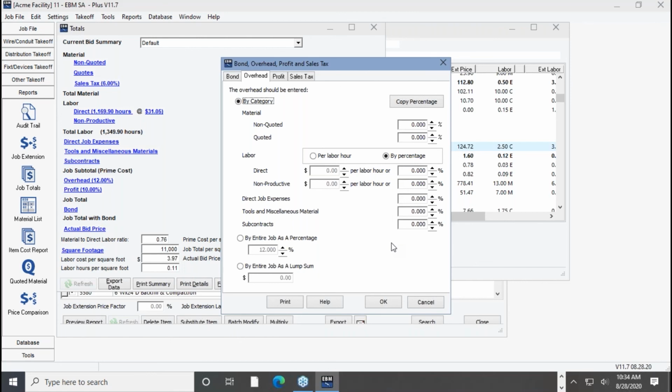Let's say it's $200,000, and they look at the total hours of labor that are paid each month. So if they've got 10 guys and they each work 200 hours a month, that's 2,000 hours. And they take the overhead and divide it into that. So they know how many dollars it takes per hour to pay the overhead.